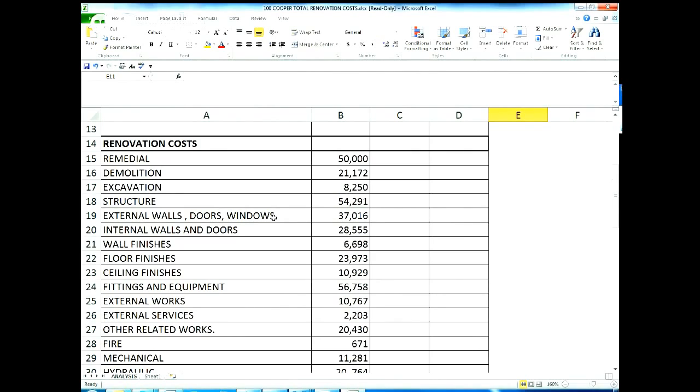So once we start getting quotes in, we will end up with a whole lot more line items on that spreadsheet. So basically, as we start getting quotes for what we're doing, the demolition will be broken down. Well, not so much the demolition, that's likely to be one figure, but other elements of it where I'm supplying materials and the builder's supplying labour and probably some materials as well. I won't get his materials breakdown, but certainly mine will go in there as separate line items, and any day labour that I employ will. So basically, whatever bills I pay end up as a line item on the spreadsheet.